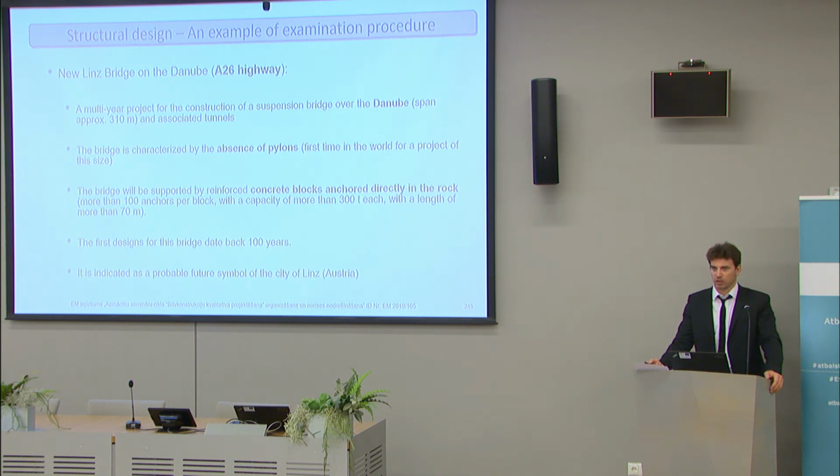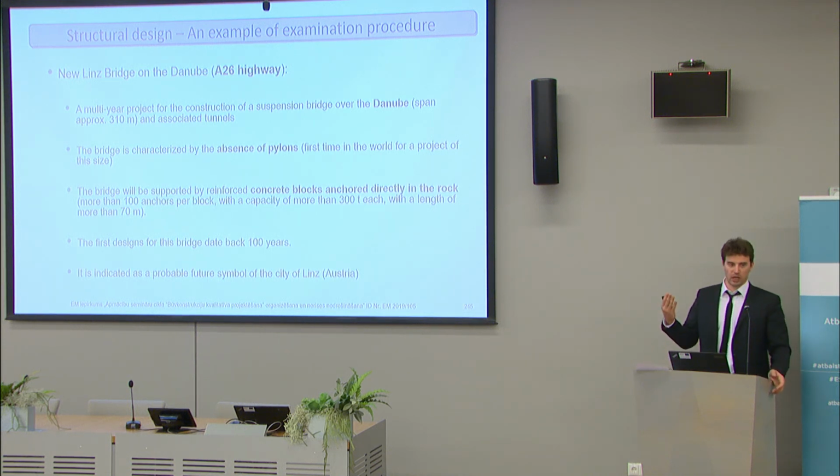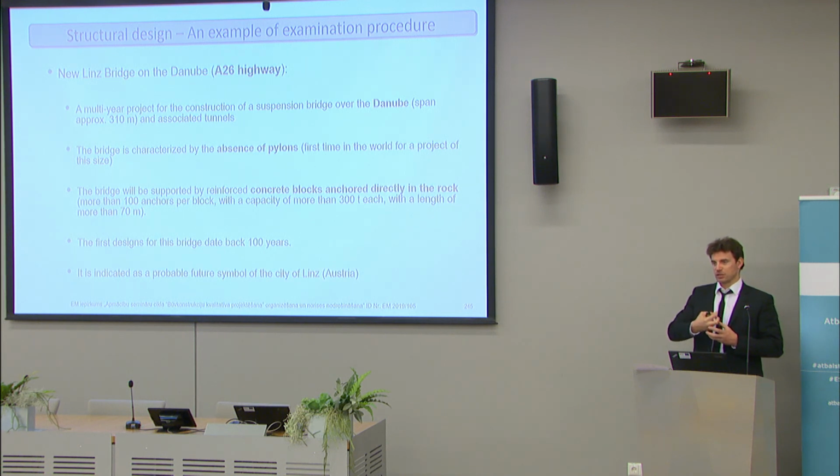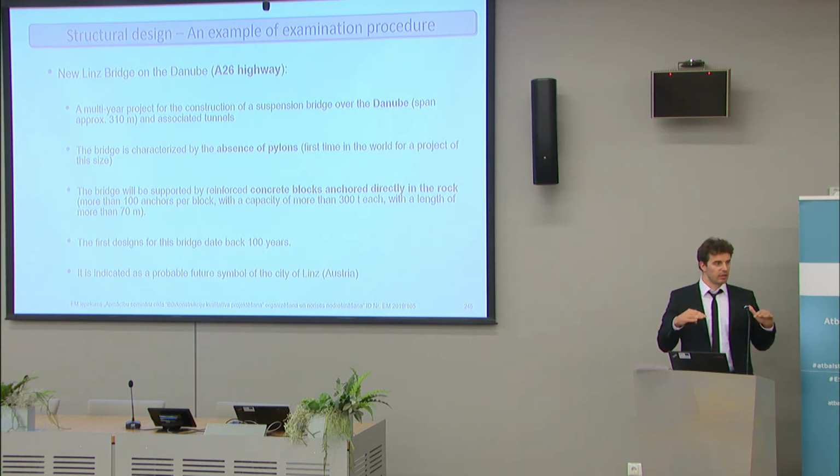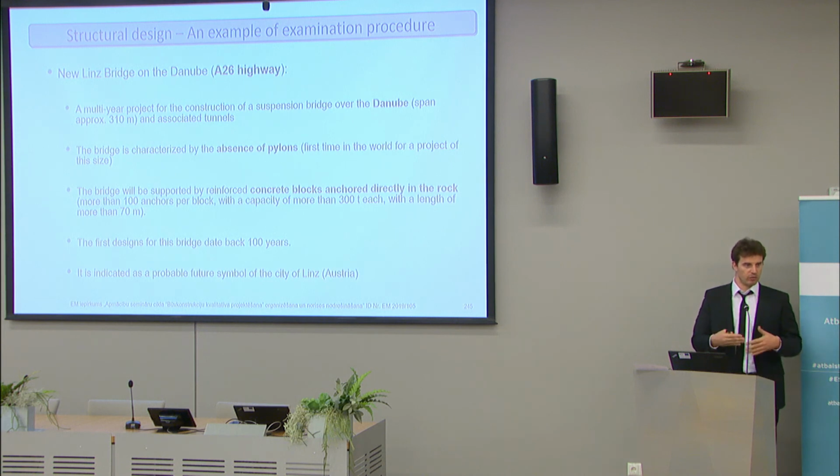And also mounting this structure is going to be very interesting because since it has never been done before, they use some techniques from a Seilbahn. It is like a gondola, you know, for going to the mountains, to span these cables from one side to the other, because of course they also need some kind of machines that can pull down the cables slowly. And there are also problems because you cannot interrupt the flow of the Danube for the boats.